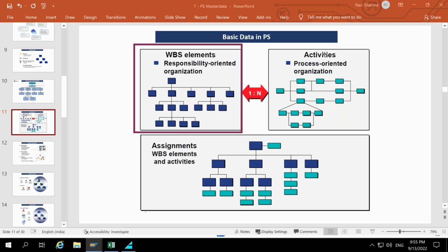So these all are the detailed activities, and these are the flow activities where we can clearly mention that one activity will be done once the previous activity is finished, where we have the relationship between each activity. That is considered your network.